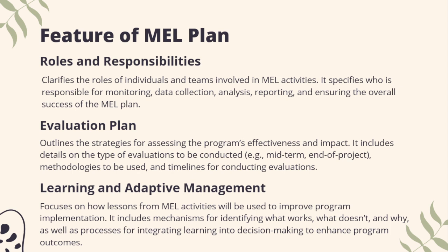Another feature, which is very, very important, is having an evaluation plan. In your M&E plan, you need to have an evaluation plan. Okay? Here we're going to outline the strategies that you're going to use for assessing the program's effectiveness and impact. It includes details such as the type of evaluation that you're going to use. It could be the midterm, whatever you're going to use. You need to document that in your M&E. The methodologies that you're going to use, the timeline, the evaluation questions, all these things have to be documented in your evaluation plan.